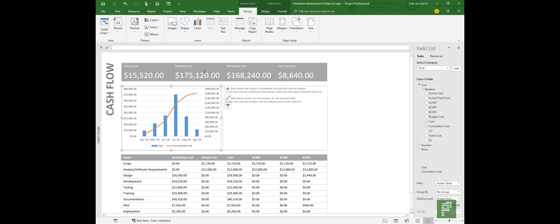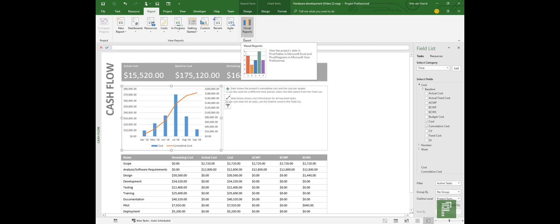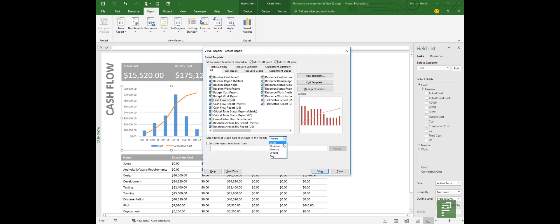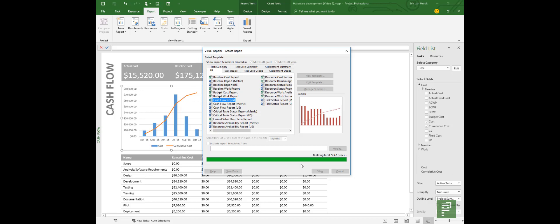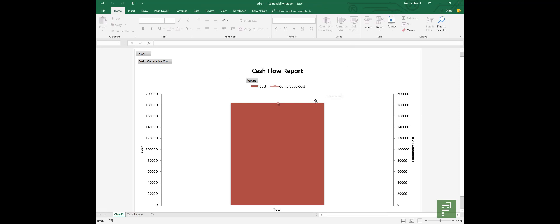So let's do the same and let's create a month basis report using the old visual reports. Again this is an Excel template but you can set the time granularity in this little checkbox here. Select level of usage for this report. So normally it will be set to weeks but you can choose years, quarters, months, days. Let's set it to months. Again you'll click on View. It will generate that OLAP cube. It will open up the Excel template and the Excel template will consume the data from the OLAP cube. But it only shows you two totals.